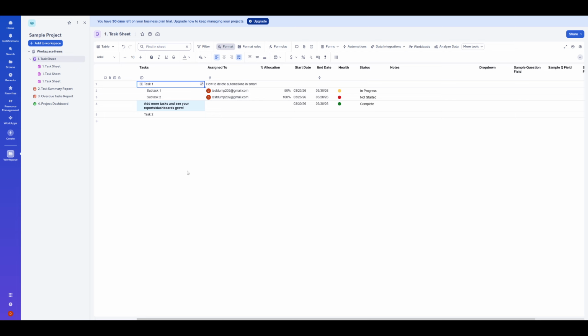First, make sure you actually have a date column. Sorting by date relies on Smartsheet recognizing those values as real dates, not plain text. A date column typically shows entries like month, day, and year, and often has a calendar picker when you click into a cell. If your dates don't look consistent, or you can't select from a calendar, they may not be stored as dates. Converting the column to the date type, or cleaning up any inconsistent values, will make sorting accurate and predictable.